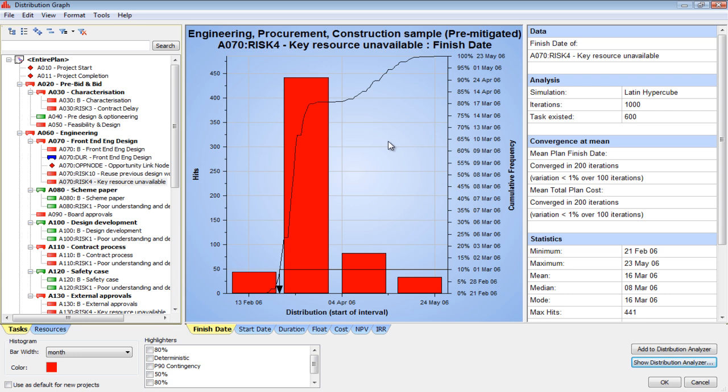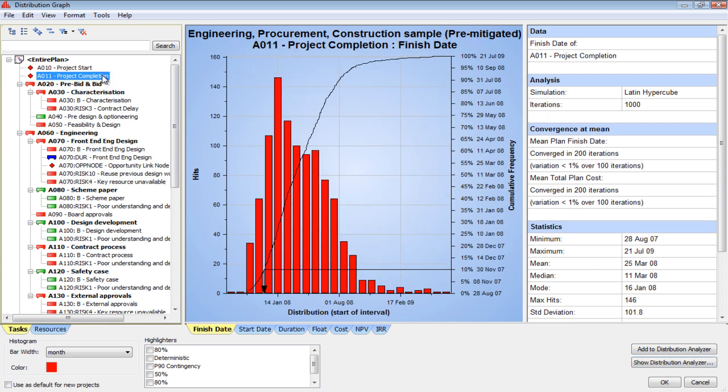I just gave you some bad news potentially. Now, if I can show you some scenario curves side by side and say, here's the bad news, but look at this curve side by side. I gave you some good news next to it. I saved you 100 of those 206 days. People start looking and going, oh wow, it's a sales tool for mitigation steps that you should be doing. You're asking for money for mitigation. Oftentimes people don't want to spend money without proof. These charts are the proof.